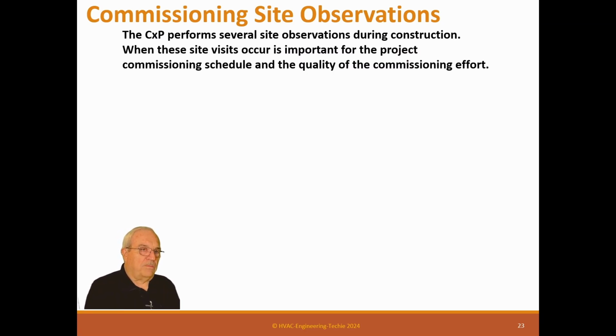Now, one of the problems with this is, all those years ago when we first started commissioning, we made the assumption that the most junior guy could do an inspection. Not a problem, because it's just looking at everything, making sure it matches. Turns out it's exactly the opposite. The most senior guy with the most experience needs to do the inspections, because there are a whole lot of things in an installation where you can see, oh, that's wrong. Well, the junior guy just won't know it's wrong, and that's a problem.